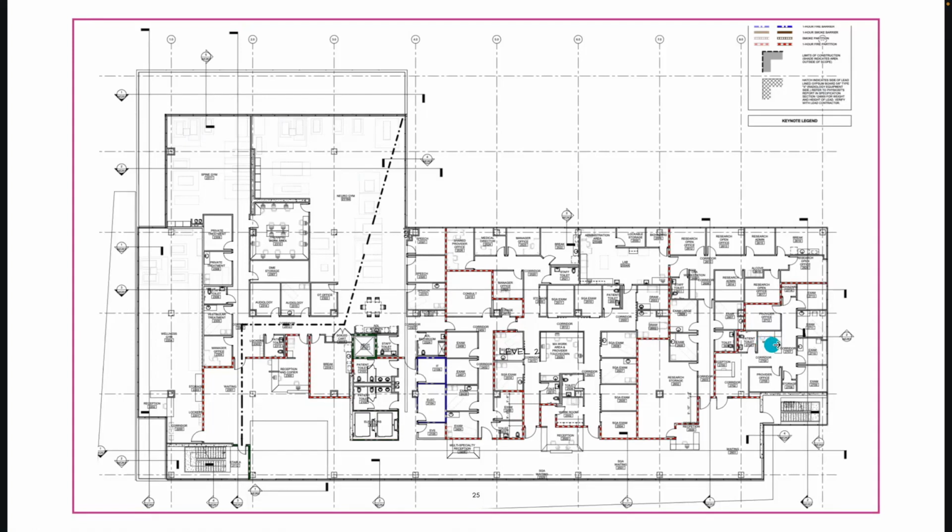You'll notice that the work density in here, or the amount of work that needs to take place, is not leveled, meaning this is not like a multi-family structure. This is not super repetitive. The work over here is more dense than it is over here, but we can still zone it out and takt it out, knowing that any type of building, any type of structure can fit beautifully inside the Takt production system. It does not have to be rhythmic. All we have to do is right size the zones. So let's go ahead and showcase how we do that.